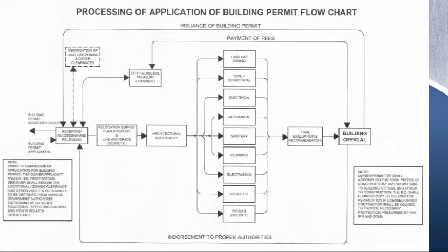Sinasabi po dito na kailangang kumpleto po ang mga papeles ng owner or applicant, and dapat ma-secure din po ng mga professional or designer ang local or the land use zoning clearances and other clearances na maaaring kunin sa government agencies, if ever the project needs to obtain a permit from the city or municipal zoning administration and various authorities from the government agencies.